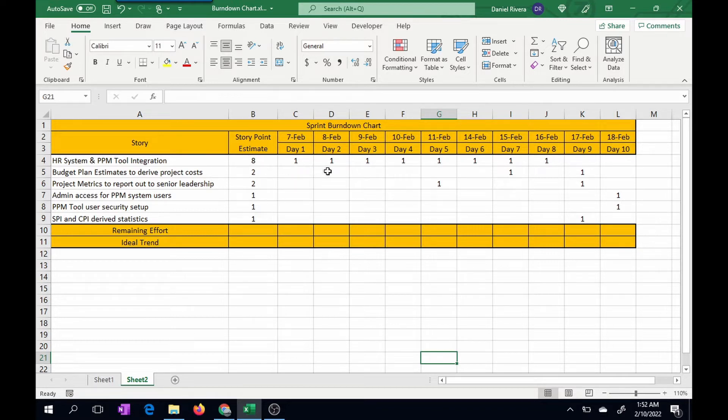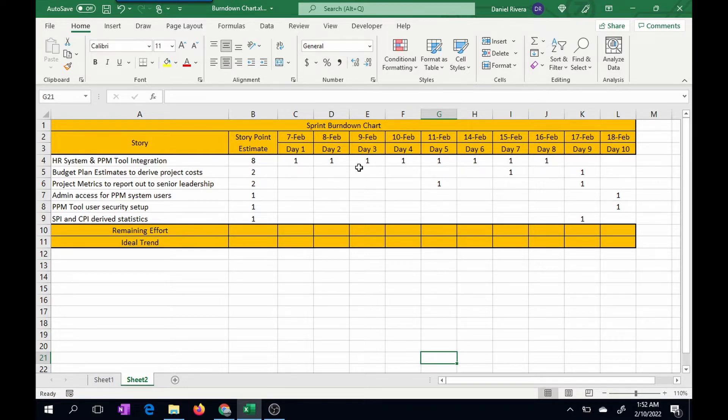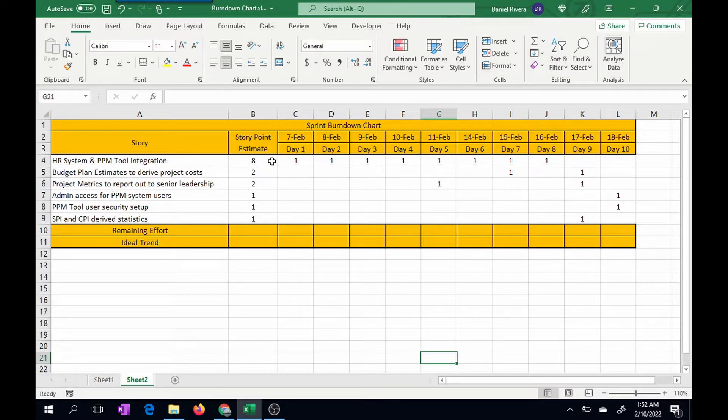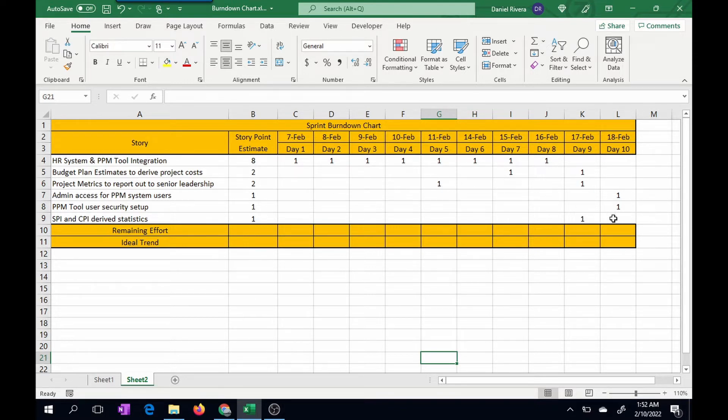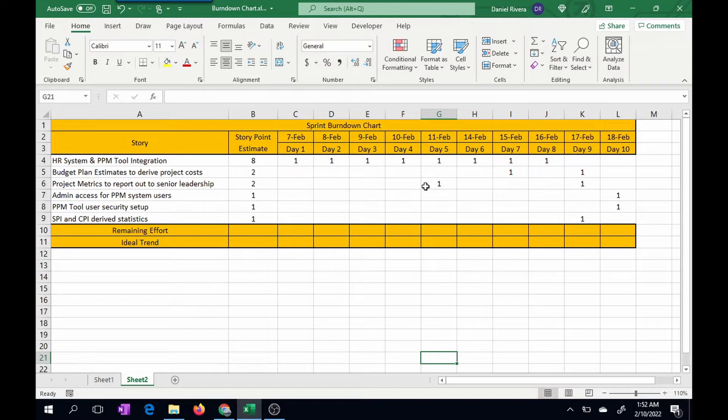What these numbers represent are the story points that were implemented. So for example, this story has a size of eight. Each day from day one through day eight, one story point was implemented from this overall estimation of eight story points. So this area to the right is the actual execution and completion of story points. And you indicate the day that the story point was completed. For example, this one was completed on February 11th, which is day five of the sprint.